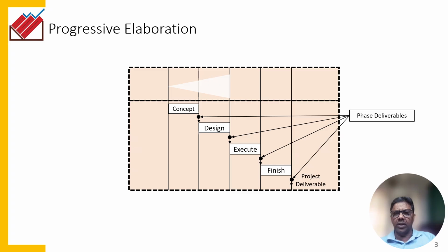So essentially, if you really see in the project lifecycle, what is happening is your product first exists in your vision. From the vision, it is thought through and moves onto a piece of paper where you have all the designs, calculations, etc. available. From the paper, it moves to reality, and eventually the end product is handed over to the end user. So clarity of scope emerges over the first two phases of concept and design, which is further executed, and you might encounter certain changes, but these are hopefully minimal in scope.